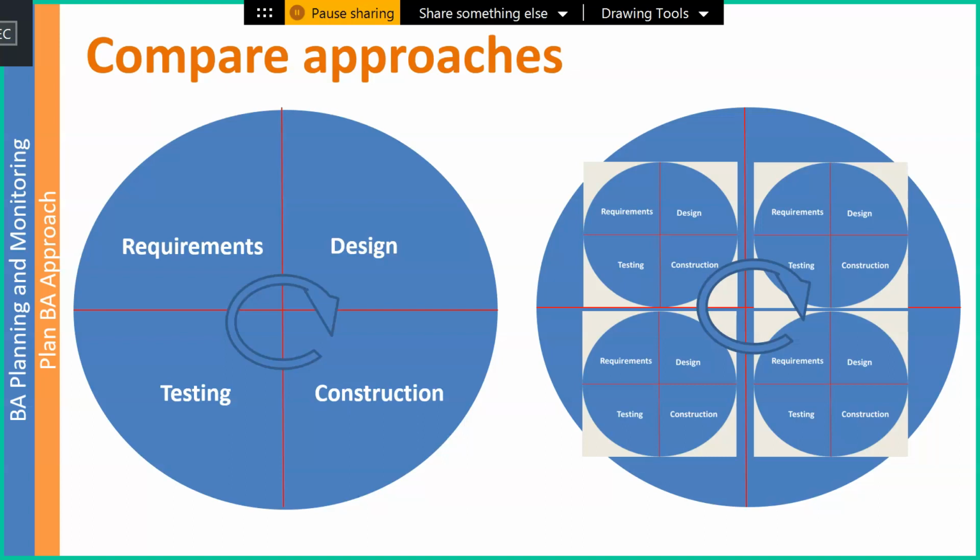But the implementation of requirements, design, construction, and testing is where you take the results of that strategy and you take that backlog of higher level requirements and you break that down and you only do a few of them. Now, a few business requirements will often explode out into multiple other requirements, whether you're going this route of stakeholder, functional, non-functional, or user story with acceptance and evaluation criteria, because they're the same thing. We're just formatting them differently and calling them a different thing, but it's the same thing.